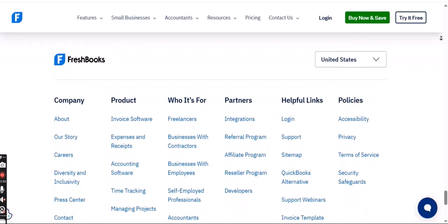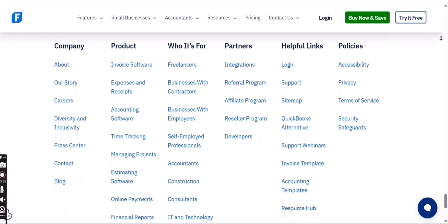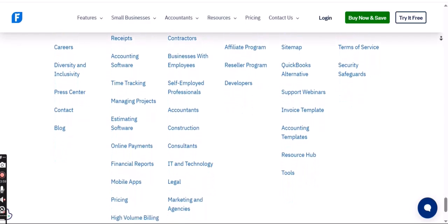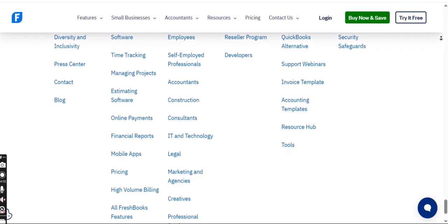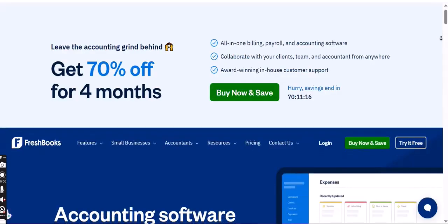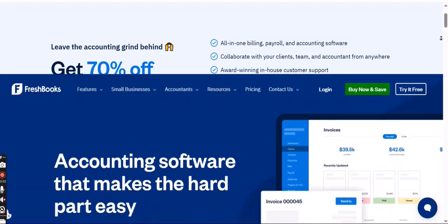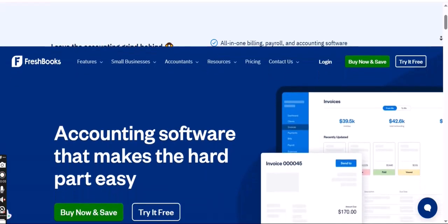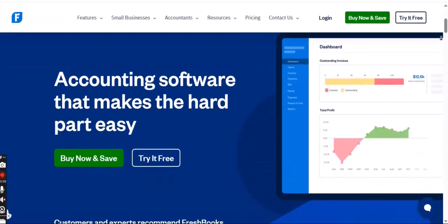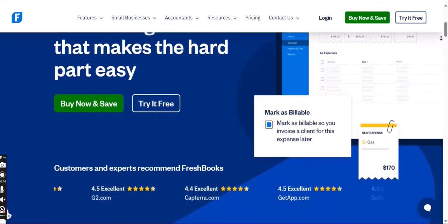Non-billable. You're tracking time and expenses for internal use or for a client where you won't directly bill for these hours, e.g., pro bono work, initial consultations. Project service/rate. If you offer specific services at a set hourly rate, you can define those here. This ties into your items and services list. Team members, optional but recommended if you have team members working on this project and they have FreshBooks user access. You can add them here. This allows them to track their time and expenses against this specific project.